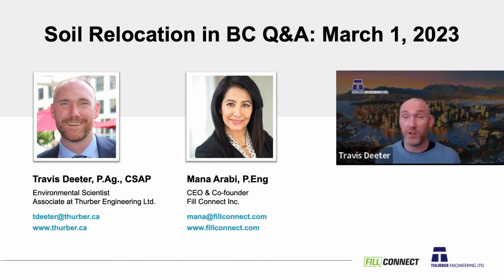I'm not sure. That's probably a developer specific question, but I can tell you from the conversations I'm having, it's typically the site owners. So whether that's a municipality, whether that's a developer, that's who is going to have to start this process. That's not regulated, anyone can technically do it. But I think, practically speaking, it's going to be the site owner that commissions this work, whether they do that through a project manager or directly with the consultant. And the bottom line is it has to be done in order to file the notification, and no one can move soil off that site until the notification is filed. So it may be a shared responsibility at the end of the day.